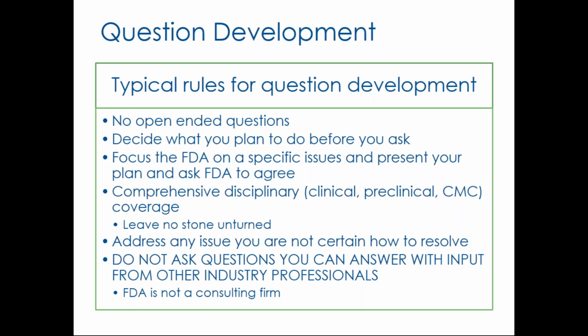The questions that you ask FDA should not be open-ended. They should present to FDA what your plan is and the justification for that plan for the specific issue. Present the plan to FDA and then ask FDA if they agree. And you need to do this across the board for all disciplines within your development program to get alignment with FDA on your phase 3 program to position you for marketing application in the wake of a successful phase 3 program.